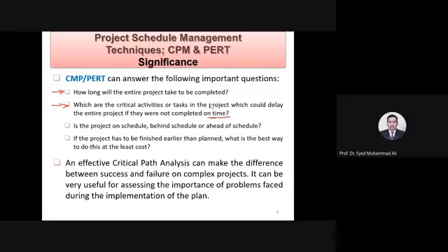Even in a small house, if you're doing a good planning, not going to even the brick level, but still, there can be maybe 100 activities or 150 activities. It is possible. And if you're constructing a bridge, and you are mapping it, planning it properly, maybe there can be thousands of activities happening. You pile number 1, pile number 2, and then pile number 50, for example. So reinforcement of deep foundation, reinforcement of pile caps, piers, transoms, and so on.